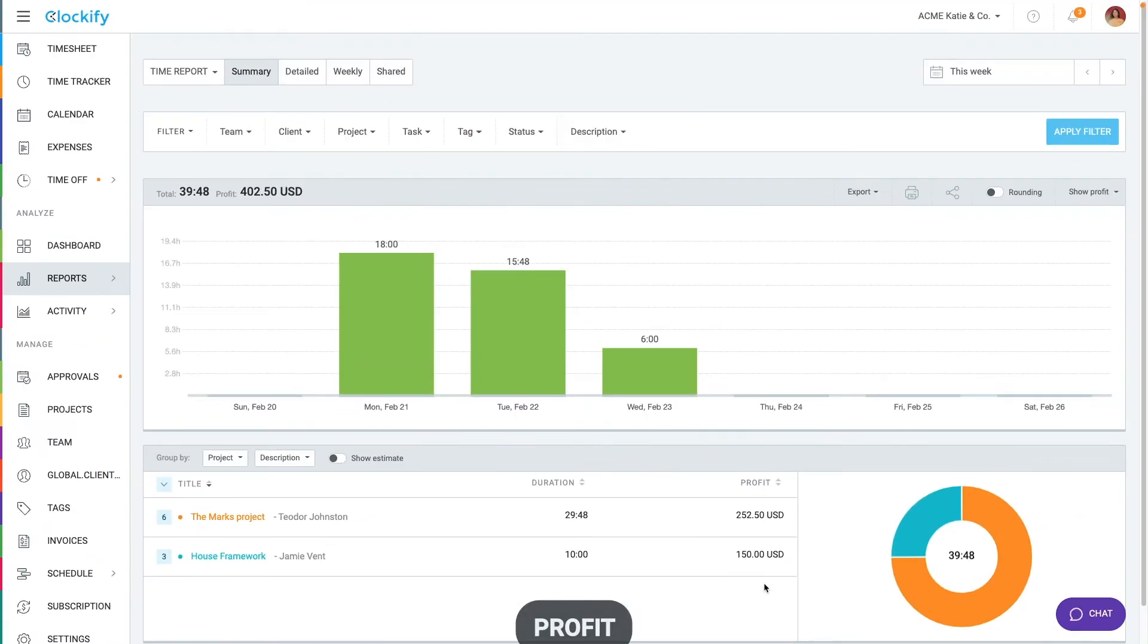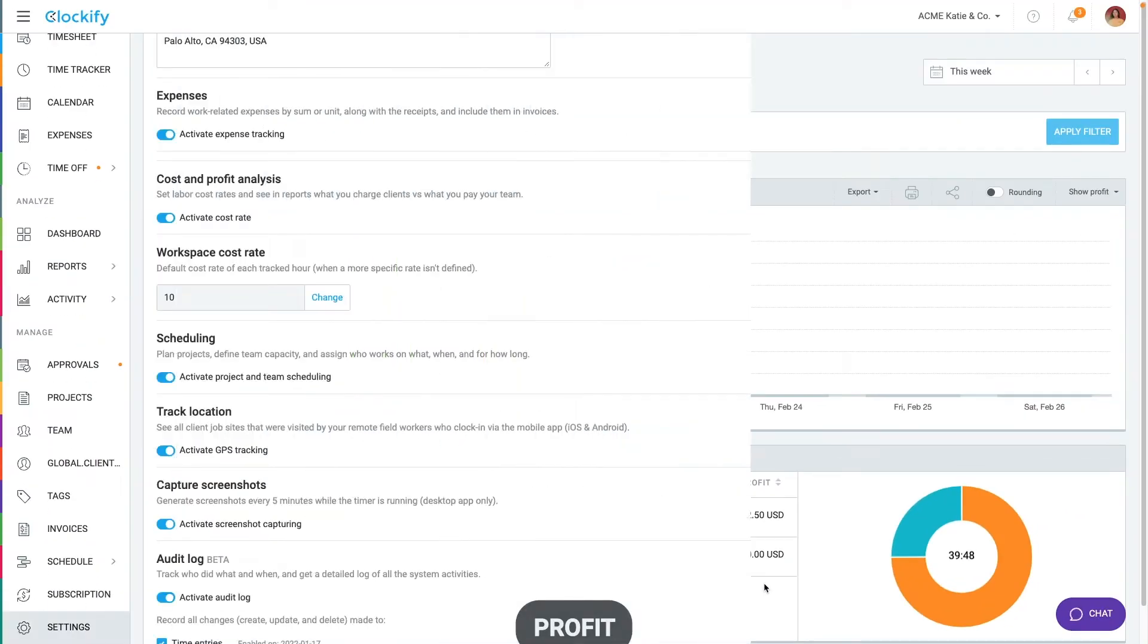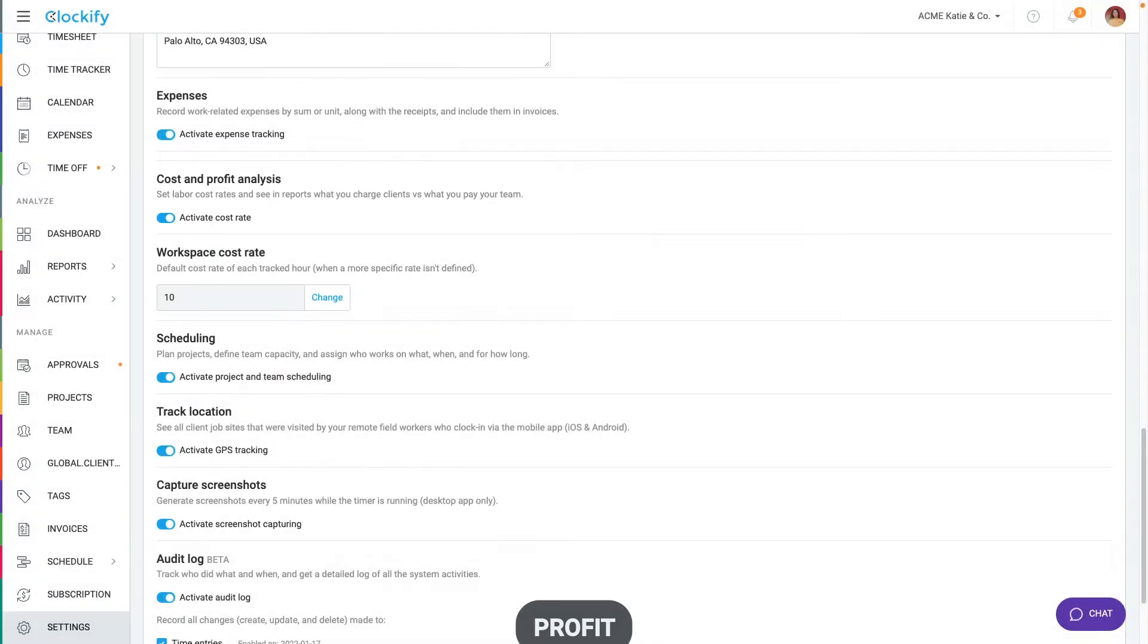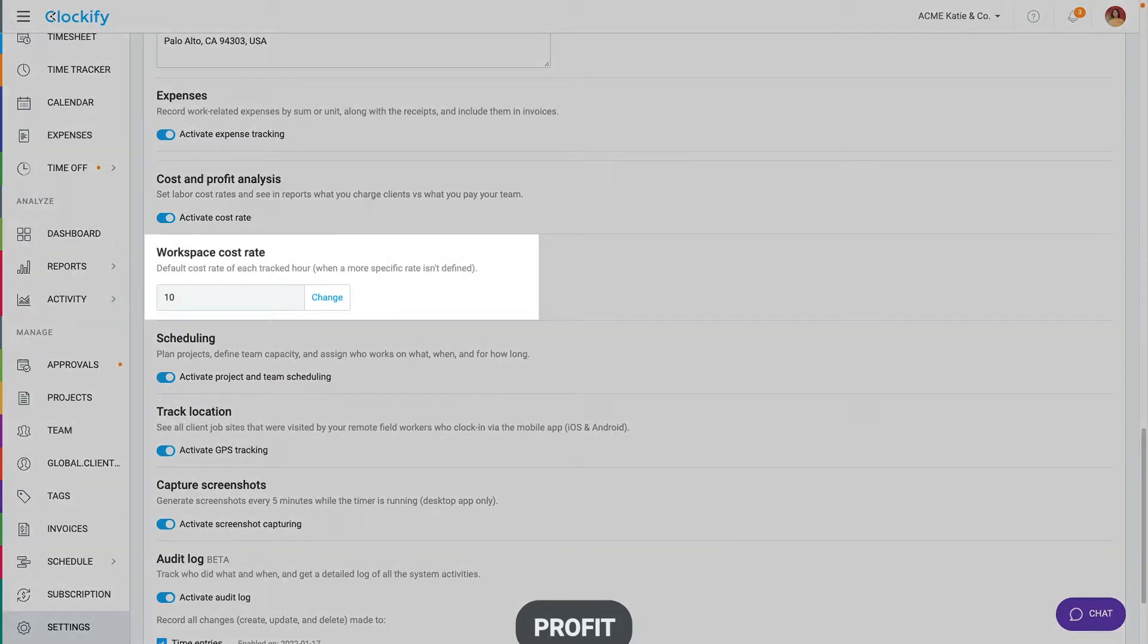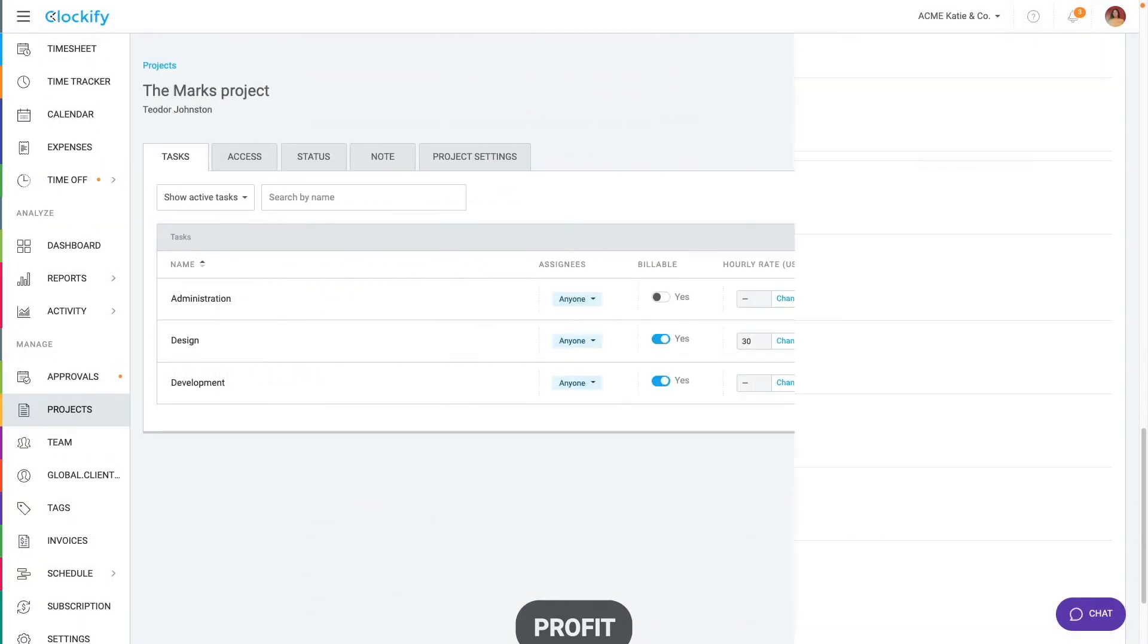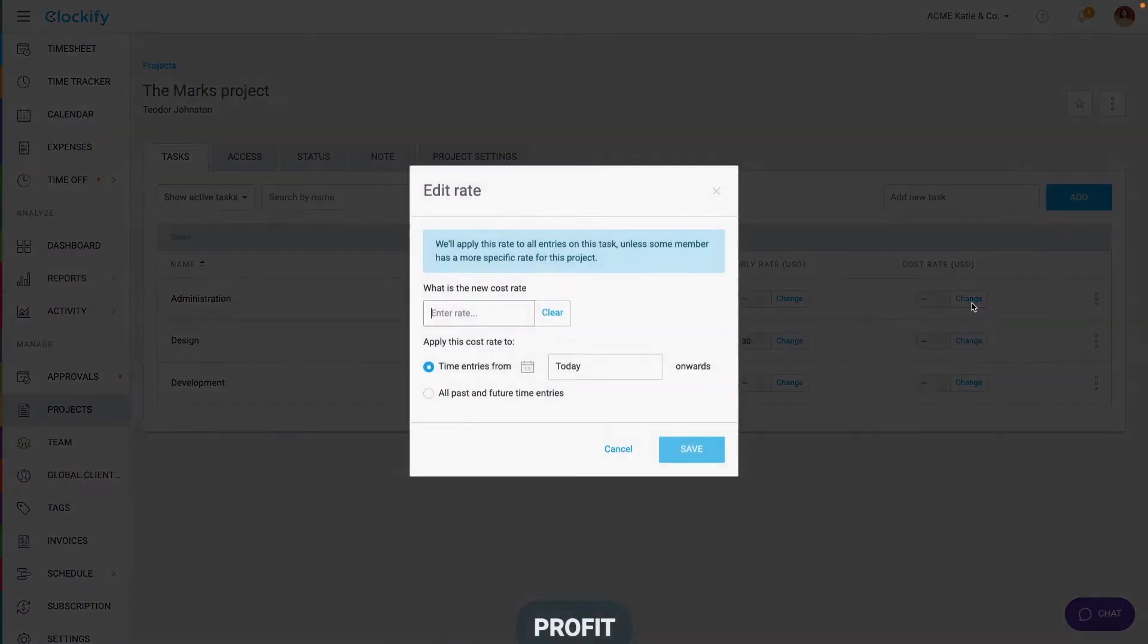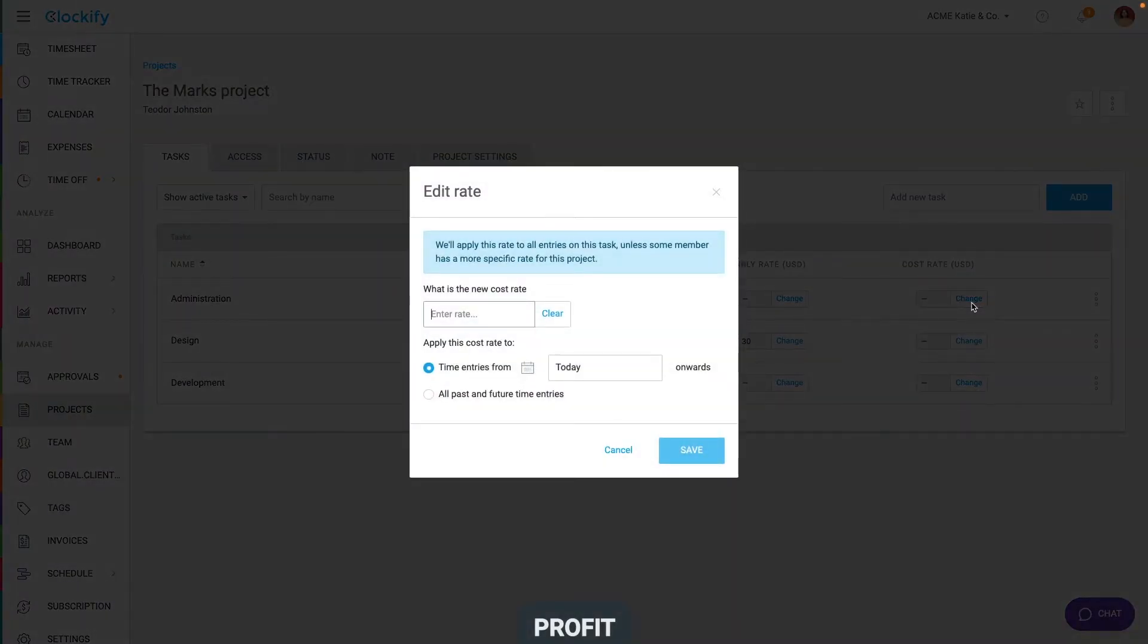To see labor costs, make sure it's enabled in workspace settings and that you've set up cost rates correctly. You define them the same way as billable rates and they work the same way except for two things. Labor costs are always applied no matter if a time entry is billable or not. Plus, you can enter zero for cost rate in case you have an activity that doesn't result in labor cost.